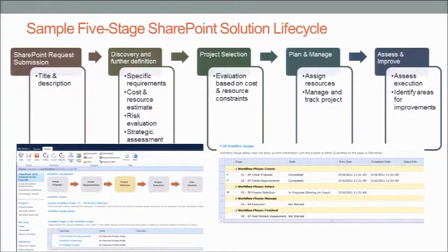What sort of risk are we going to take? How does it fit in with our overall priorities? If it then becomes part of a series of projects that now have to be chosen, which is what we go through here with the project selection, the way we do that is use the portfolio management tooling which is built into Project Server, and it allows us to compare our projects to each other, to stack rank them, and to see which ones we wish to go ahead with.